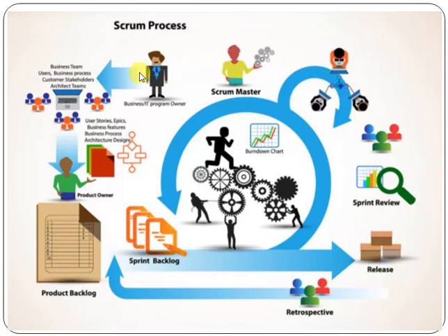Now we can talk about the Scrum process. First of all, the product owner makes the product backlog. Product backlog means that he discusses with the customer and gets the knowledge. For example, if you are implementing an e-commerce solution, the product owner is the leader, he gets the knowledge from the customer, and he is the customer voice, and he documents all the requirements in the product backlog. Just think of this as an Excel sheet or a Word document which has all the requirements of the product which you are going to implement.